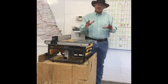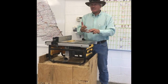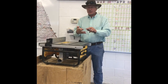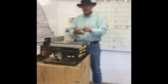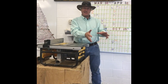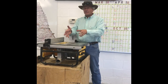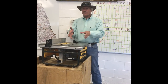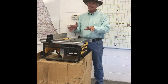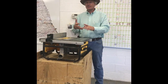All right, in closing, I just want to make a couple of observations. In that letter, I actually sent the general contractor documentation of the humidity, the temperature, the moisture content of that maple immediately as we were offloading it from the truck and after it had been in that facility for a day. As soon as we go back to start to install that job, we will continue testing on that maple. For one thing, we want to make sure it's very close to 7% before we install it, and we will continue to share that information with the general contractor.